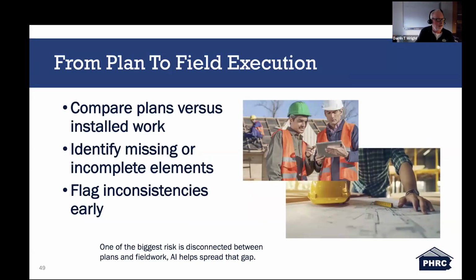From plan to field execution, one of the most common issues in construction is gaps between what is shown on plans and what is built in the field. AI can help compare design intent and field conditions by analyzing plans alongside job site photos and reports, identifying inconsistencies early and helping prevent costly corrections or inspection failures.